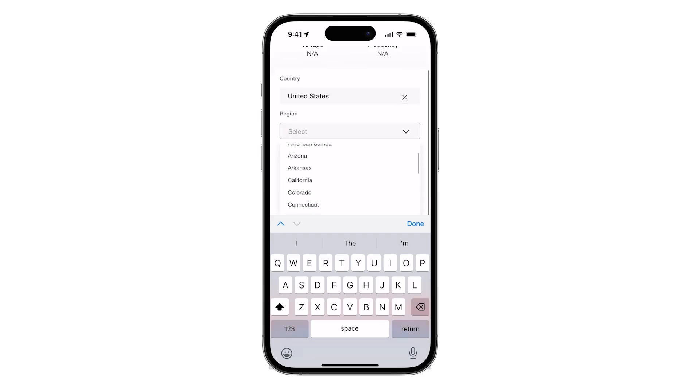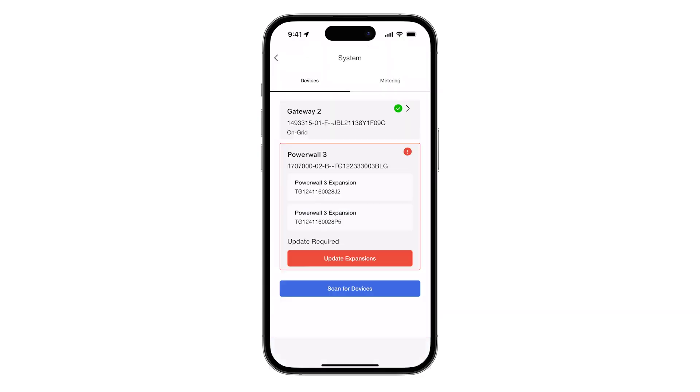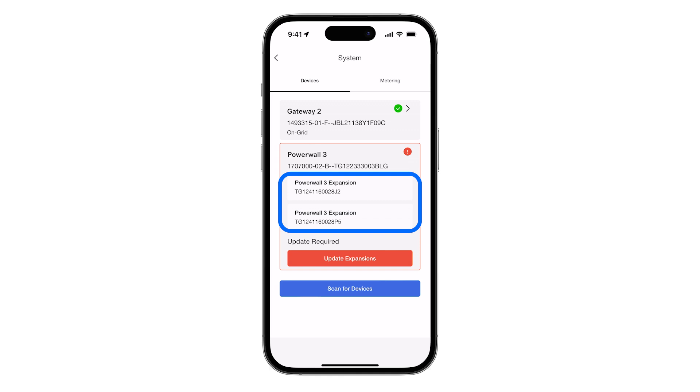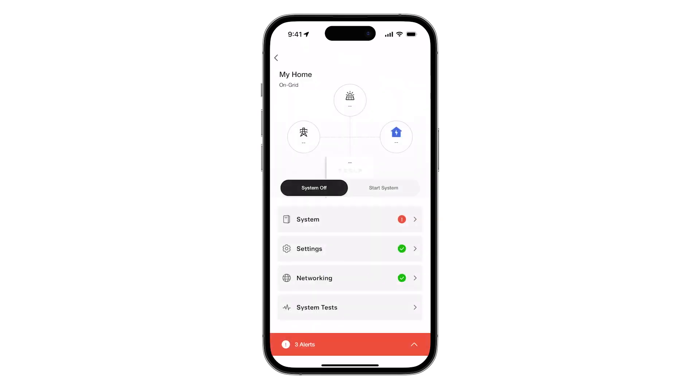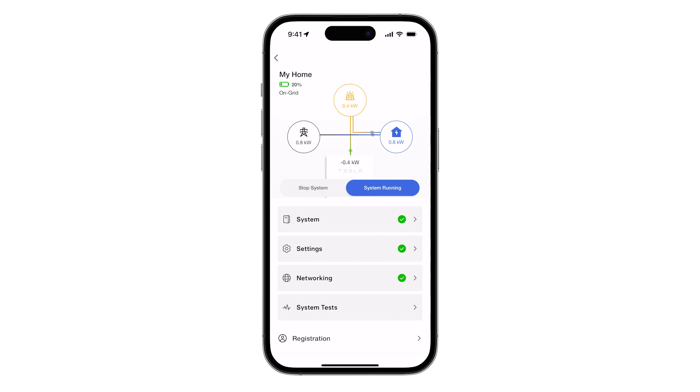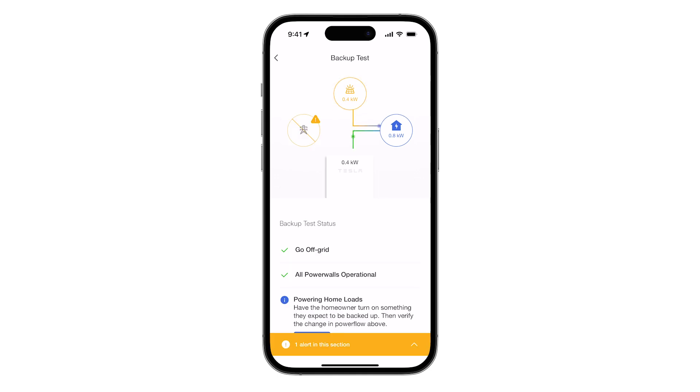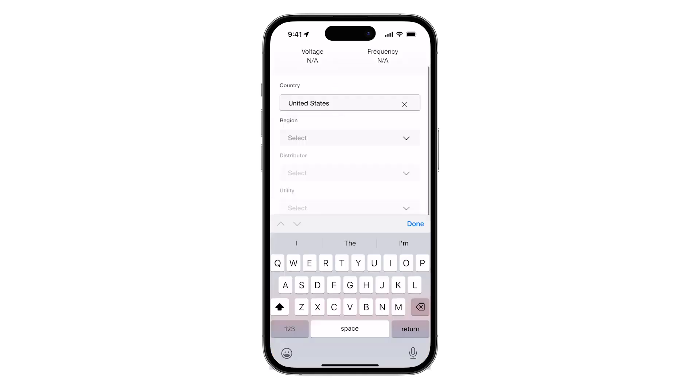On the Devices page, verify that all Powerwall expansion units are detected and present in this list. If an update is available, tap Update Expansion and wait for it to complete. Continue with the standard procedure to finish commissioning, including starting the system, performing a backup test, and completing the customer registration.